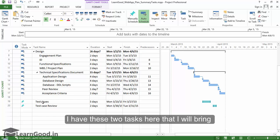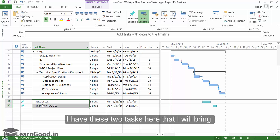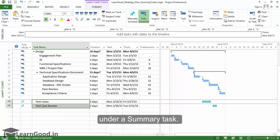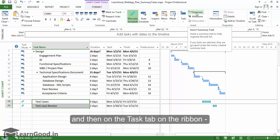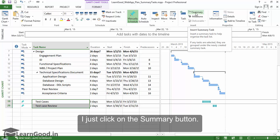I have these two tasks here that I will bring under a summary task. First I select the task, and then on the task button on the ribbon I just click on the summary button.